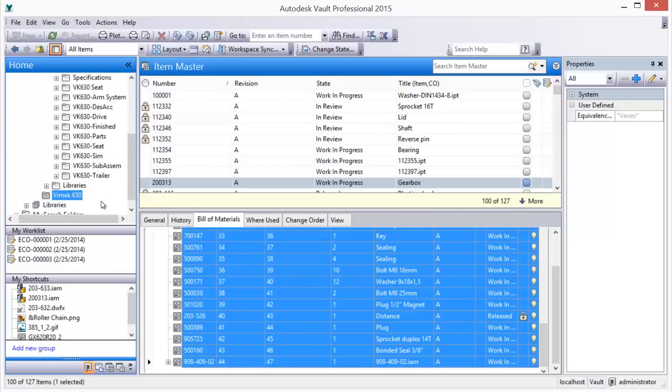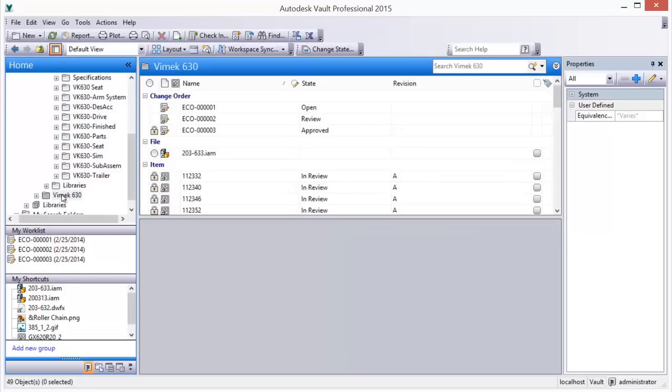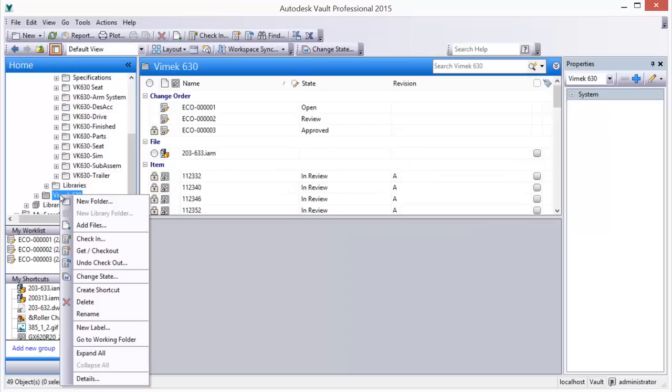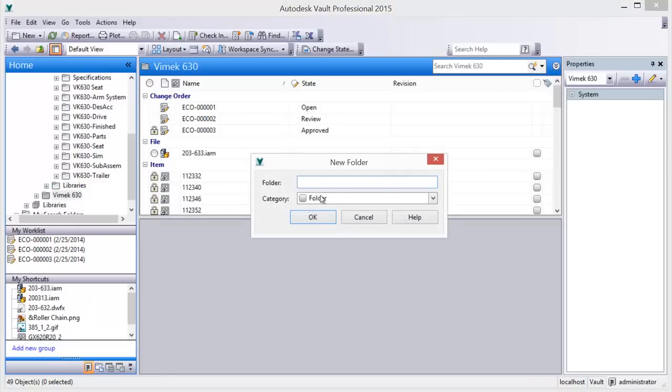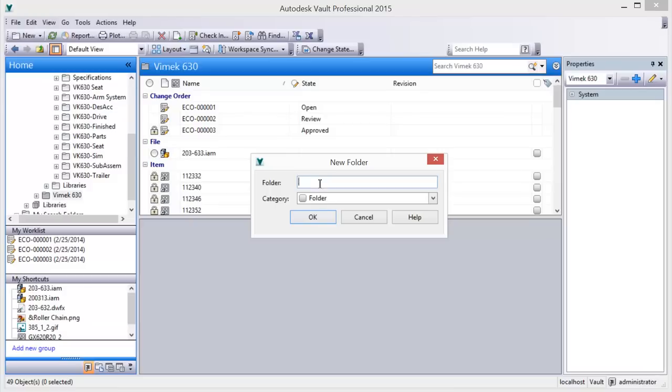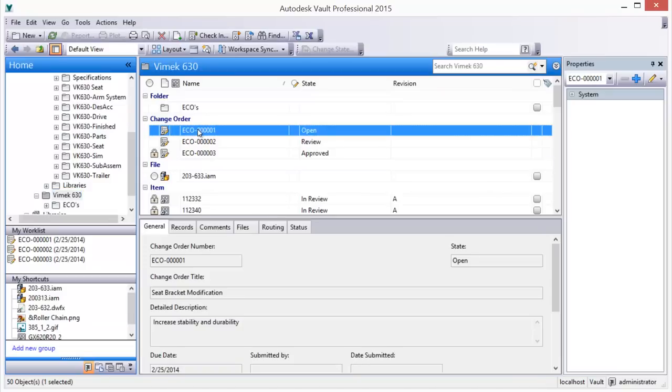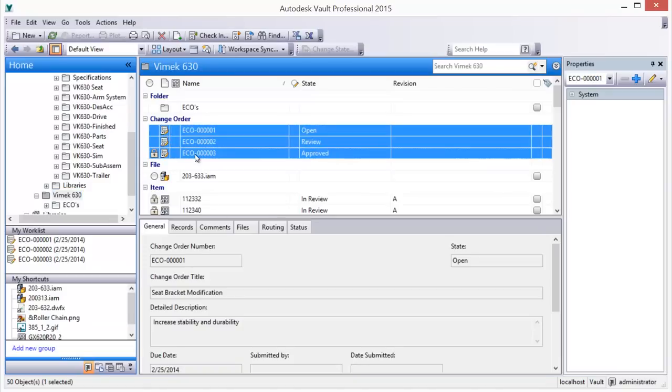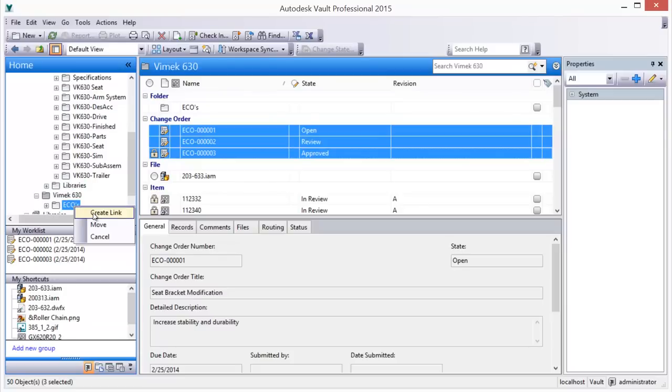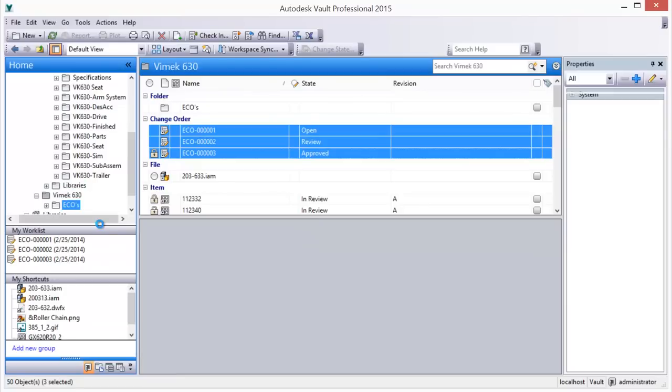Creating a link to and opening a linked folder will populate the data referenced in the target folder. This means the project folder can contain a reference to other folders elsewhere in the Vault, regardless of their location. This also allows the setup and management of subprojects. Data can also be easily organized further by the use of subfolders, if desired.